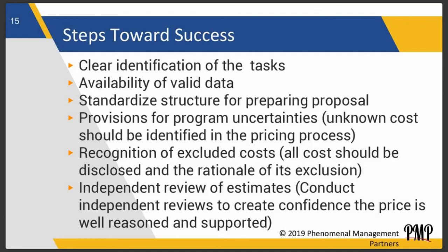The government is going to do an independent estimate. So please go through the process of sitting down with this proposal, give it to your technical person, give it to your proposal writer, give it to your manager, and come together and say, hey, we're confident enough that this is a well-supported proposal, and this price is well-reasoned and it's fair and reasonable.